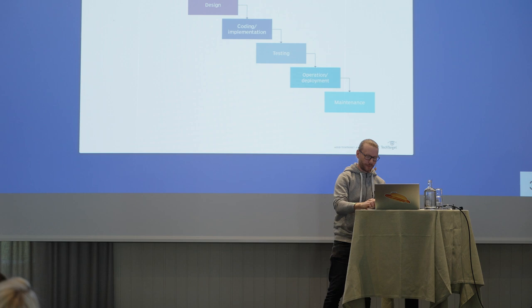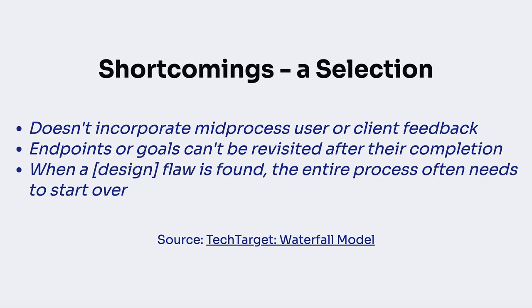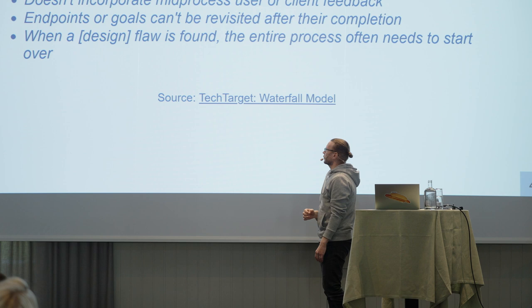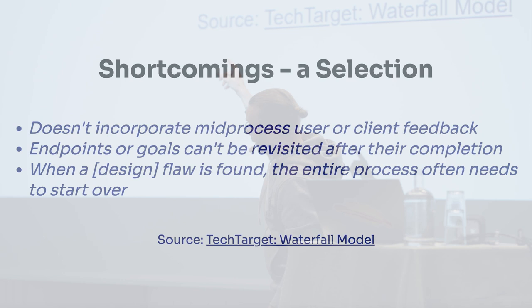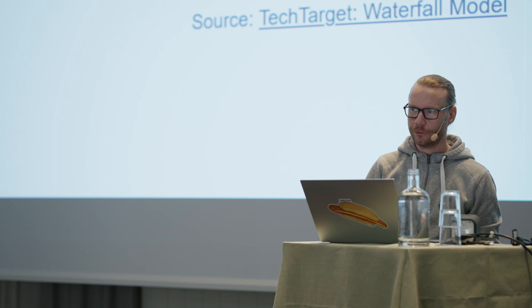So it sounds great, but did you know that there are problems with this approach? There are problems with this approach. One is we don't really talk much to the customer, just in the beginning and the end, so we don't really know if we're building the right thing. We cannot really go back - once we have a specification, it's finished. So too bad if you got it wrong. And if you get a bad design, you might have to start over the whole process. That's a nice cost overrun you will be having.